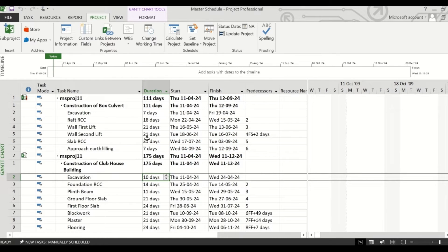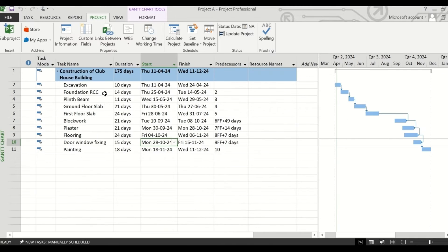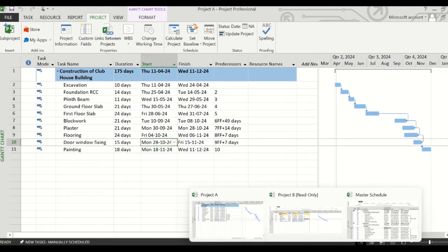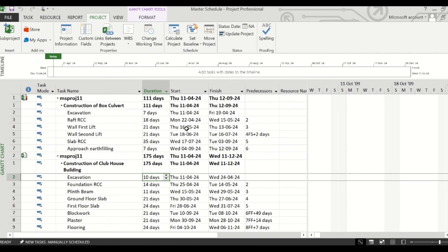So you can save this from here and the changes will be reflected in your original schedules. And if you track Project A and Project B in their respective original files, the same effect will be reflected in the master file also. So after every time you receive the tracked schedule from someone doing it on your behalf, you can ensure that the file names are Project A and Project B — the same as your original files — and replace the files there. Then you can open the master schedule file and get the summary at one place.